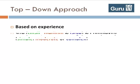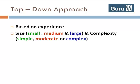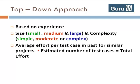Another technique is to classify applications based on their size and complexity, and then seeing how long a project of a particular size and complexity have taken in past. Another approach is determining average effort per test case in past for similar projects, and then using estimated test cases of the current project and arriving at total effort.